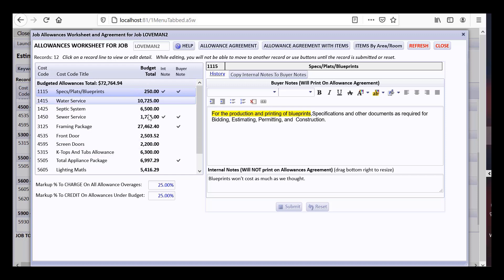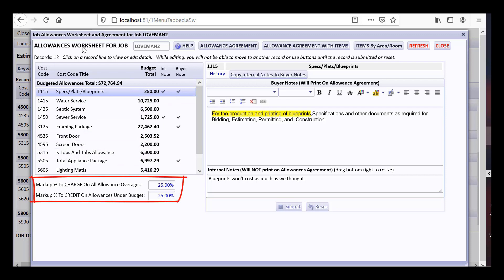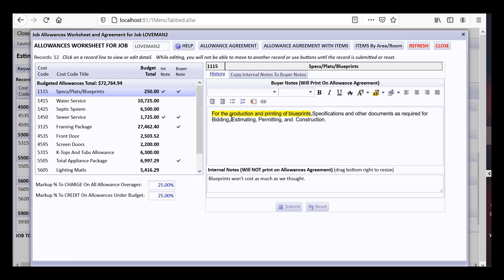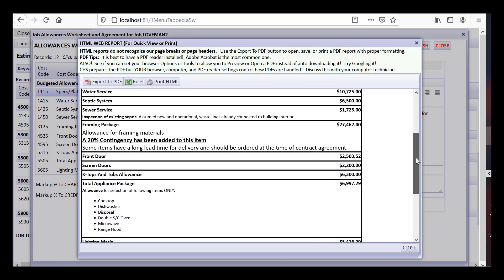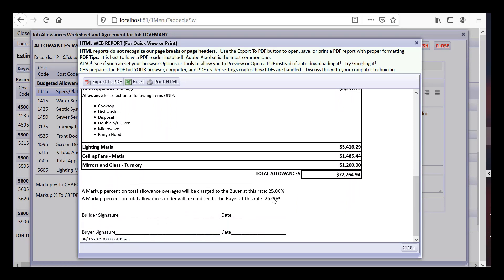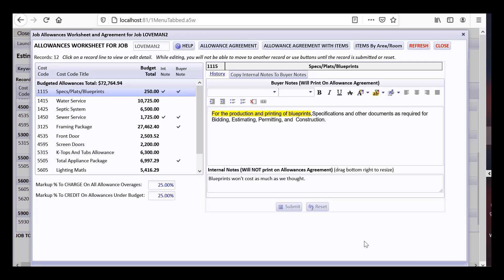The allowance agreement can be exported to PDF showing the 25% markup terms for over and under allowances. Allowances are not change orders — CHS tracks how much you go over and under allowances and includes the allowance adjustment on the contract balance report. As an example, let's say the front door had an allowance of $2,504 but the buyer selected a higher-quality door at $3,000. Issuing a PO for $3,000 causes the ECC to reflect the PO amount since it's higher than the budget, showing the cost center going over budget.